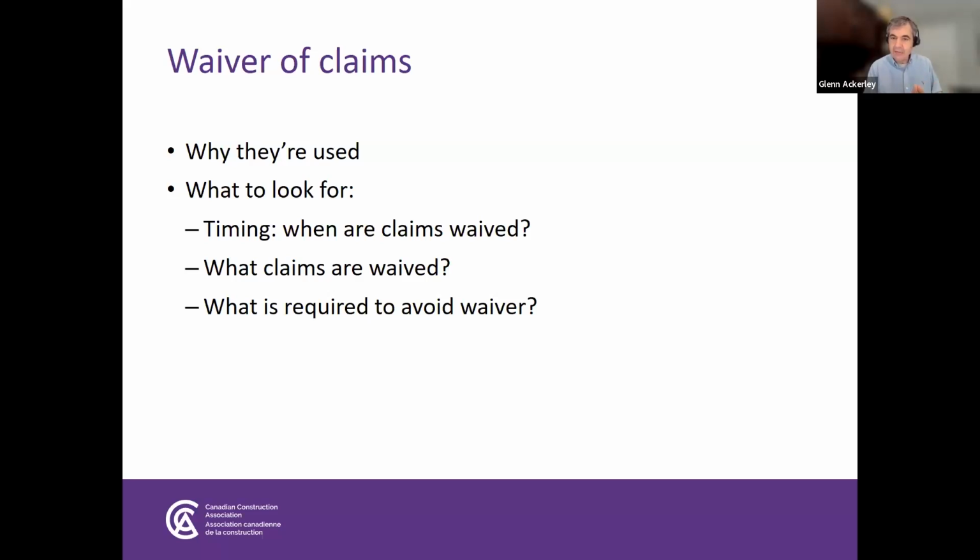And instead, by the terms of the contract you just walked us through, those claims are waived, meaning given up. You have no ability to bring them three to six months later when you've figured out after the project what your damages actually are, because you never gave the notice at the time you were required to give about that claim. So that I think is key.